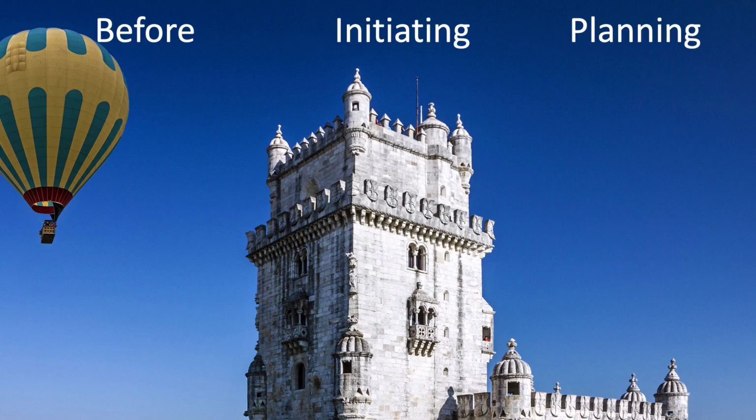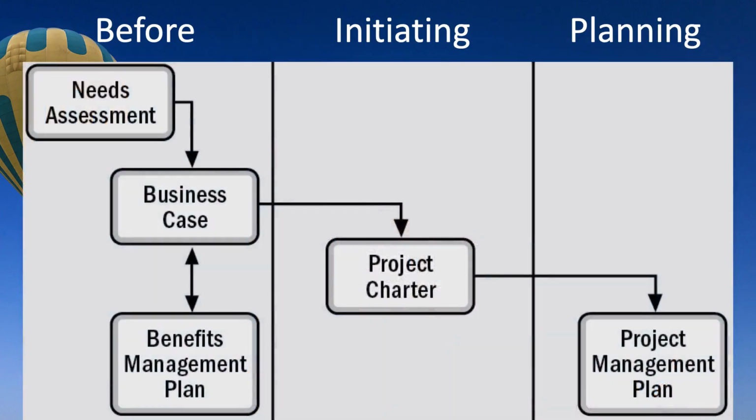Do you remember which documents are created before the project charter? Remembering these documents that are developed before the project's initiating processes will help you to remember some of what goes into the project charter. These prior documents are the needs assessment, which identifies and analyzes the needs that first got people talking about doing a project. Then there's the business case, which includes the cost-benefit analysis and a recommendation for a project.